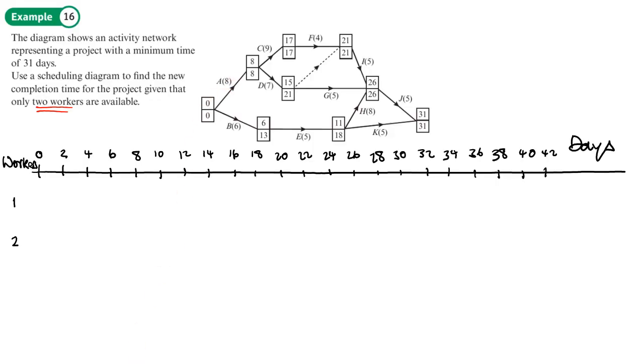I know I'm only going to have two workers. We'll start with activity A here, that's going to take 8 days. Activity B needs to start and that's going to take 6 days. We'll tick them off as we've done them. Now we can either go from activity C or D from A, but C has no float. So we're going to put C in because there's no float and that's got a length of 9 to take us up to 17.